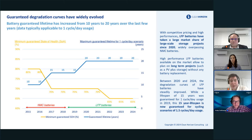It's a very interesting question and something not to be overlooked, because that's very often the case: you find very competitive capex on one side from one equipment supplier, and not so competitive O&M cost. Typically, the cost that hurts the most during the lifetime is when you purchase the extended warranties, which can be quite expensive, and for most investors and banks investing in projects, it's actually a requirement to get those guarantees. So it's not something that is optional in most projects.